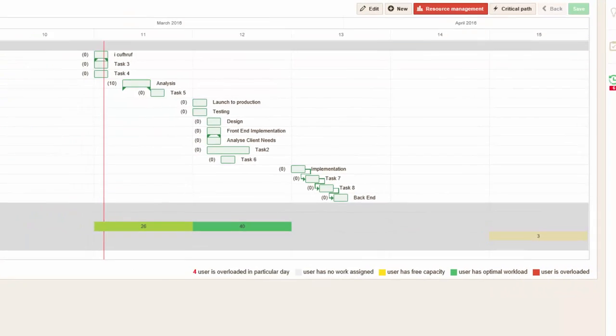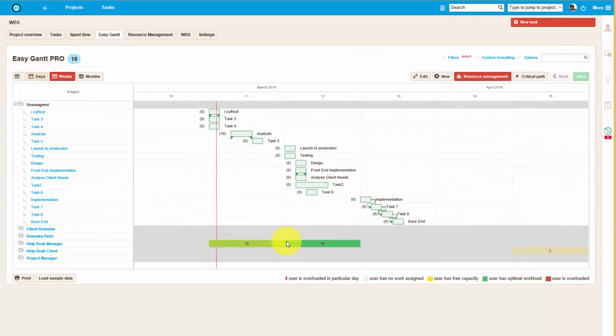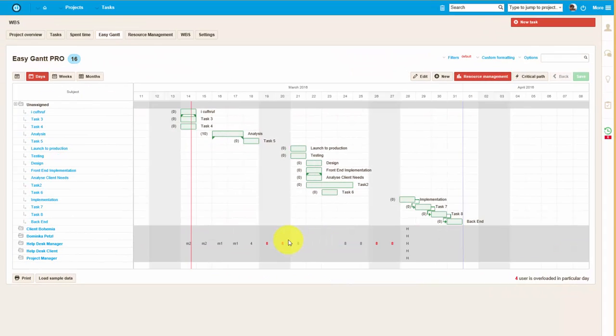If you go to the day view, red numbers indicate that this user is overloaded on one particular day.